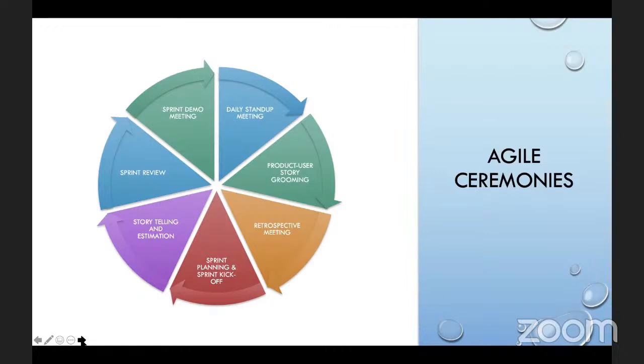We cannot exceed this threshold or cap. If our sprint velocity is 50, when we are planning a sprint, once we prioritize stories and get to that point of 50, that's it. We cannot add any more stories to the ones we're about to work on.